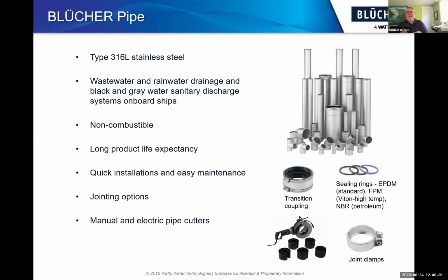But when you factor that they needed to buy drains anyways, and they would have been stainless steel, to buy what they had in their old building would have cost maybe 10% more, or 10% less, I'm sorry, and the savings in 1 month covered that difference. So the second month they were ahead of the game. The third month they were ahead of the game. So putting the right thing in the right place can generate some significant savings. Which brings us to pipe.